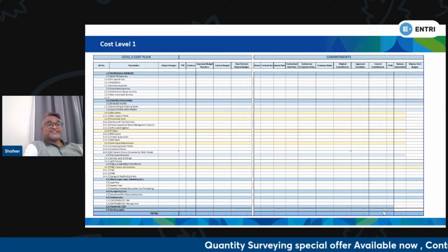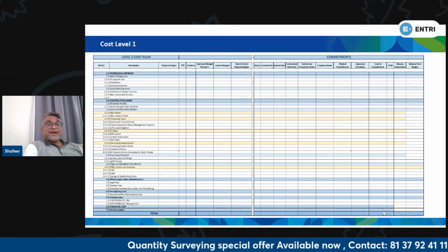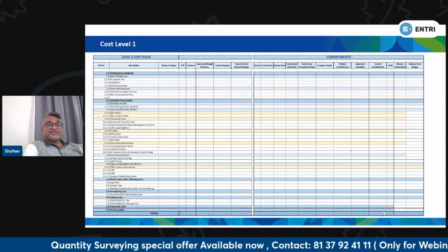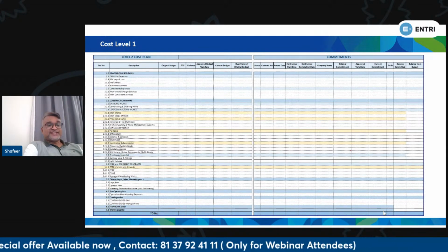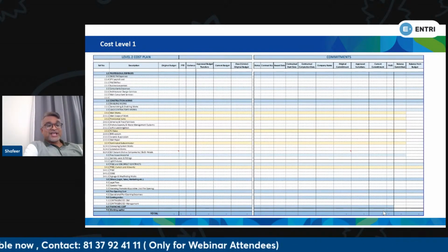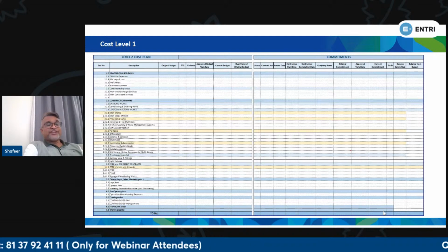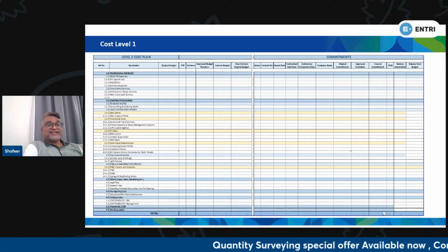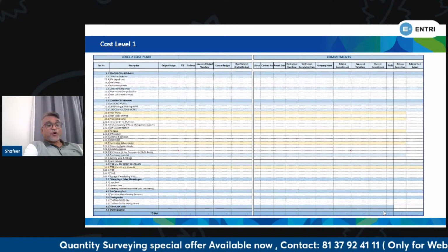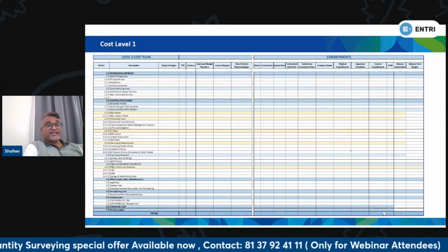Now, coming to the construction work, this will be based on our master procurement plan: enabling works, then lead contractor main scope, lead contractor provisional sums and PC rates, and nominated subcontractors. Apart from that, we have some free-issued materials as per our master procurement plan, such as sanitary ware and light fixtures, and other direct contracts: FF&E, OS&E, and signage and wayfinding.